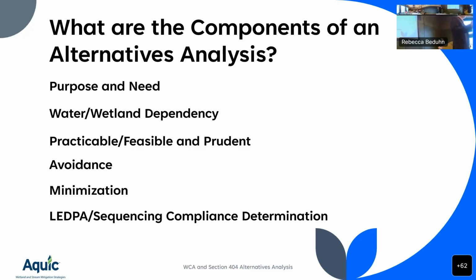Offsite alternatives mean, is there another place that this could be that's available? And it's practicable, meaning it can be done, considering costs and logistics and technology and all that kind of stuff. So we compare all these different sites potentially against the screening criteria and against the purpose trying to be achieved.